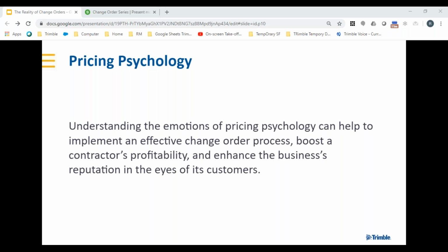We don't just assume that the client's going to always be the one that's price sensitive. It's going to shift. Prior to the work being done, the contractor typically has the advantage because we're going to get that presented to them. We're going to get that signature. We have that need that we need to have dealt with. So we have the implementation. Of course, we have, if you will, that power in our hand at that moment. If we do the work and we let that reside to the end of the project, we have just literally shifted that power right into our client's hands and made it much more difficult for us.